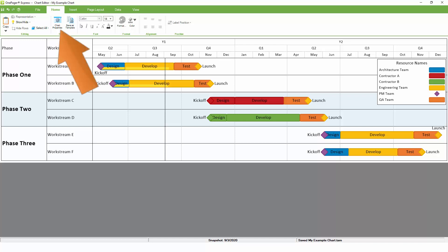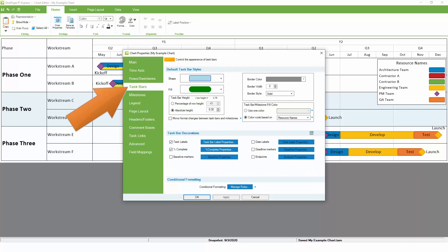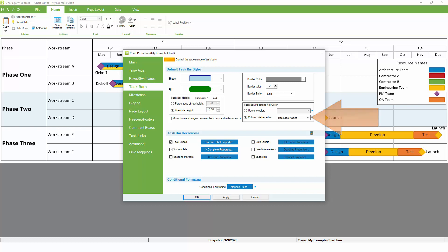To do this, go to Home, Chart Properties, and then to either the Task Bars or Milestones tab. On the right-hand side, you'll see that Quick Color Coding is already assigned by Resource. This means that for each resource in the project plan, OnePager will assign a different color. Just like your swim lanes, you can switch this to any other field from your project plan to quickly change how colors are assigned.